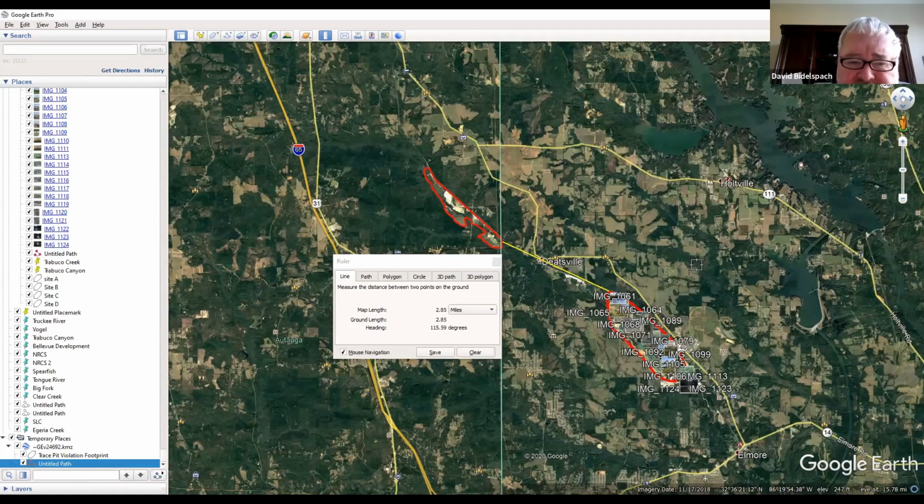And so Chris is kind of reluctantly, so my point is, I'm saying, guys, this is the time to refine our concept plan and get it more accurate to what we need to do. And one of those refinements that I wanted from you was whether you felt safe about that upper pond being 10 feet lower than the creek. And you seem to be okay. And we've got lots of fill material coming out of the embankments in the ponds that we can pack along the right bank of that stream to give us a really good buffer so it won't cut through. So that was one of the refinements.